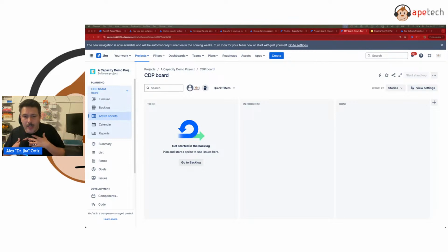And what we ended up doing is I had a single Jira project for software development, and I had a lot of boards, and each team had its own board, and I made team a required field. So whenever you created a story or an epic, you had to assign it to a team, and then based on the team, it would show up in the right team board. Awesome, right? Really good use, I think, of the team field. It gave us one single project to manage. Multiple teams had their own backlogs, independent sprints, and whatnot.